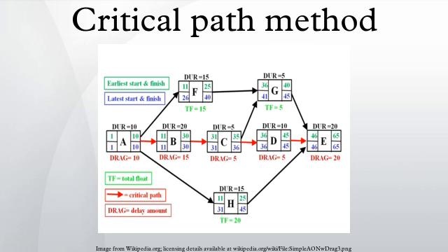Activity D, with a duration of 10 days, is parallel to G and H, and therefore its drag is equal to 5, the float of G. These results, including the drag computations, allow managers to prioritize activities for the effective management of project completion, and to shorten the planned critical path of a project by pruning critical path activities, by fast-tracking, and/or by crashing the critical